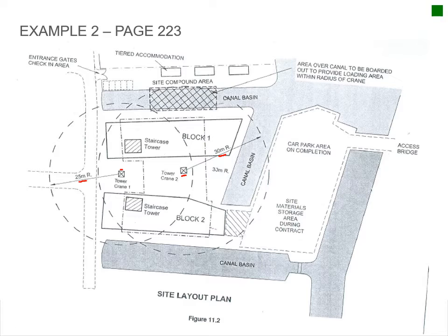So you've got fixed cranes, so you will use this first crane, say up to a point. You will see it's not in the basement. The basement is that dotted line going around there. So you will have at one stage done everything around the crane, and then you need to take down that crane and then fill that section up later on.